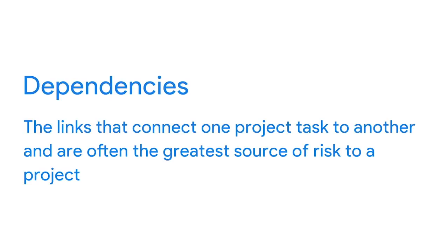We've covered risks and how they affect a project, but we haven't fully discussed dependencies — arguably one of the biggest factors in a project. Dependencies are the links that connect one project task to another, and they're often the greatest source of risk to a project. Two or more project tasks may have a relationship where the completion of one task is reliant on the initiation of another, and vice versa. Think of these tasks like a line of dominoes — if one domino falls, it'll knock the next one over, and so on.